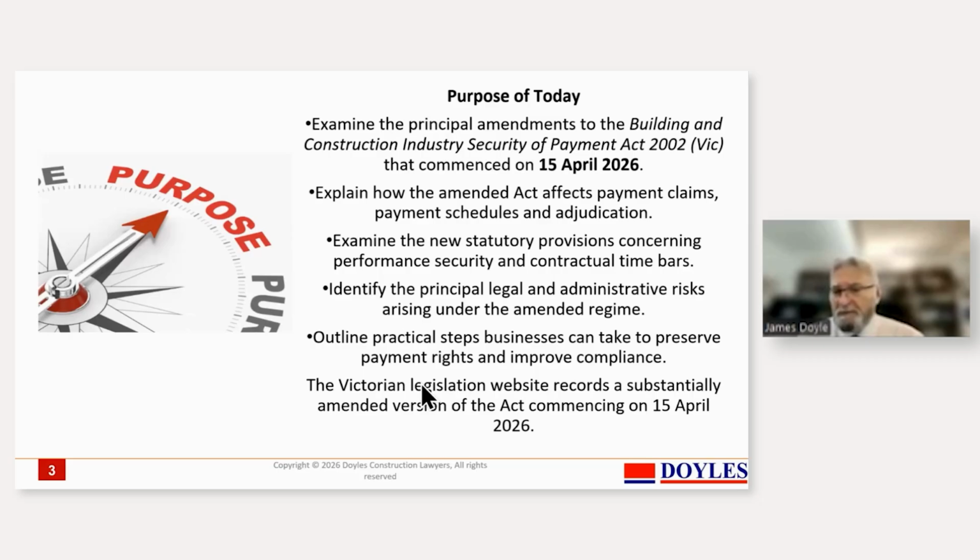Looking at the Security of Payment Act as it's developed over the years, we've got to understand that from a contractor's perspective, this is a very important piece of legislation. And fundamentally, when my clients talk to me about having a contract, I say to them from the start, you should look at the contract and you should look at the claims that you're going to make under that contract as if you are going to push them all through SOPA, all through this Act. And it's important that you have a very complete and adequate payment claim, because if you don't get it right, you can upset your whole process.